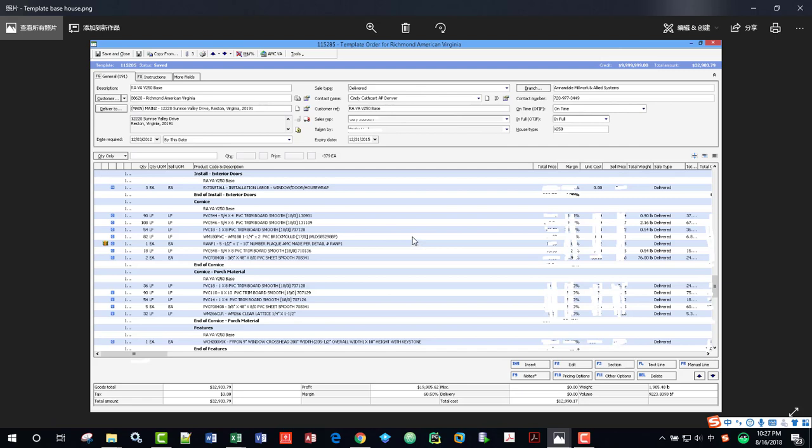Sometimes if the takeoffs for options are not on record, or if the margin is low, then probably the takeoffs in the template are wrong. Or if there are options on the contract but there's no template, we need to create the template for the options. So that's how I started to do the takeoffs.